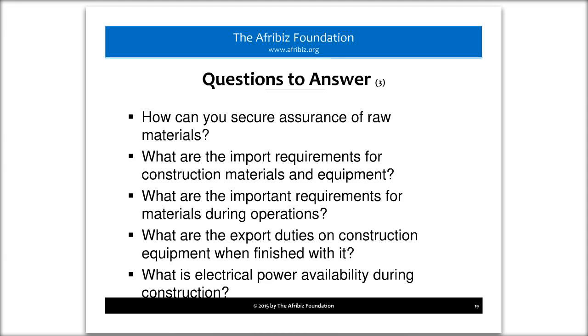And so one good example is you want to know if they're going to charge you customs duties for it. In many countries, it's part of their investment package that when you're bringing construction equipment into the country for the purpose of a project, you don't have any customs duties on it. And when you need to take it out, it's the same thing, because you're using it for a very specific purpose. It's not used for resale or for sale in the market. It's going to be the same thing, materials during operations and maintenance. What are going to be the duties affiliated with that?